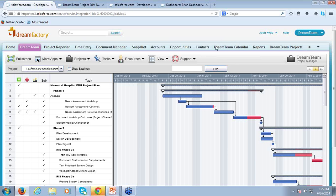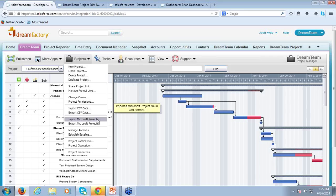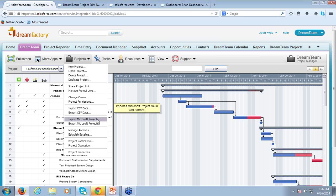Absolutely. From the Projects dropdown, you can import or export to or from MS Project. You can import from MS Project as an XML file — just save your projects in MS Project as XML and upload that to DreamTeam. We can also import from a CSV, so if you're working with another application or tracking things in Excel, we can upload that as well. For both instances, there's a bit of data massaging needed — for CSVs it's more on the front end getting the proper format, and for MS Project it's ensuring resources are mapped correctly. These imports are really just to help load historical data, and once in DreamTeam it's very easy to duplicate and reuse projects.